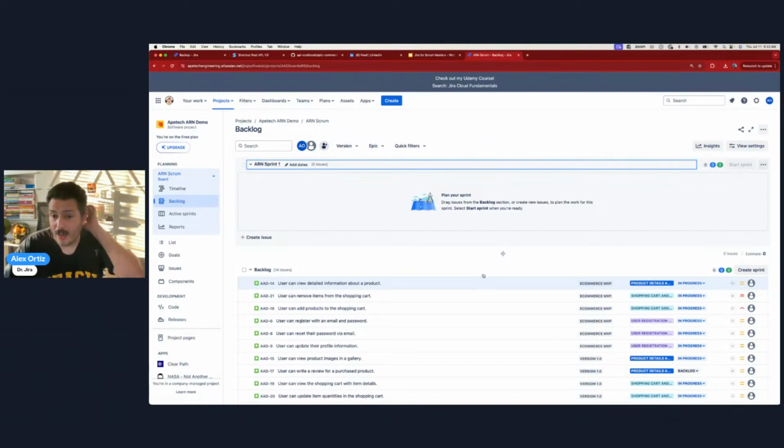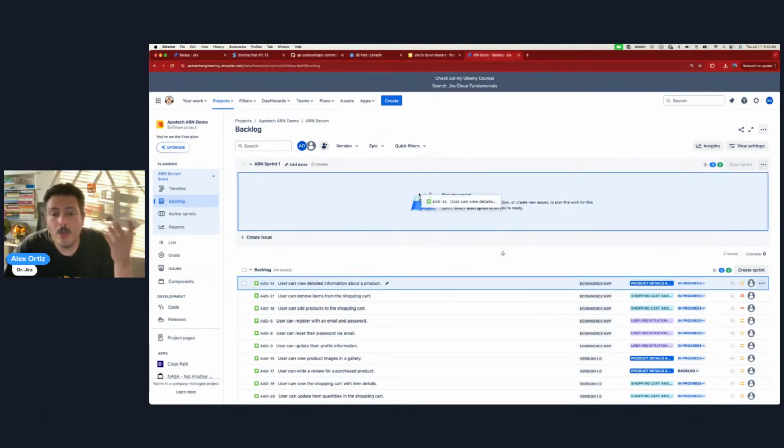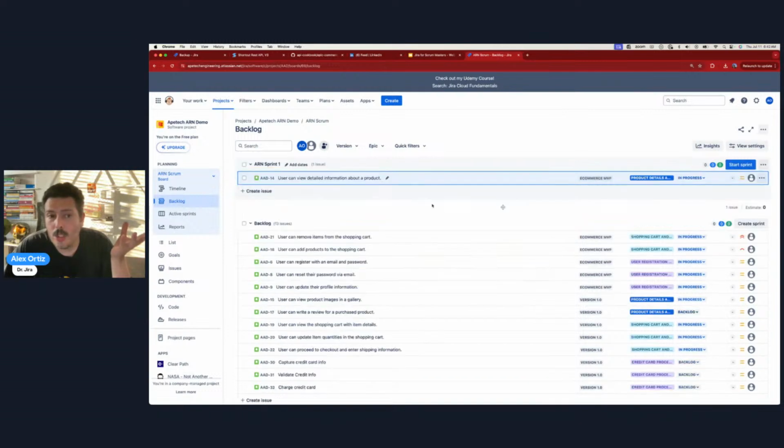And so there's a lot of different methods and techniques here as well. So I'm just going to show you what I do, right? But obviously, when you come into sprint planning, you should have some understanding of what your capacity is. This is going to play a critical role in how much work is enough work, right? And so you should have a good indicator for your capacity there. But once you have your sprint planning, all you've got to do is essentially grab this item and drag and drop it into your sprint, right?